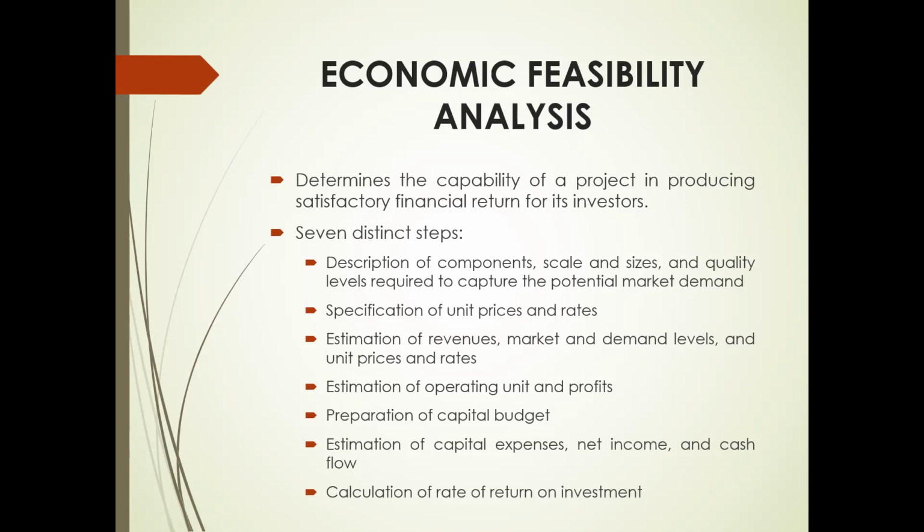The most realistic capital budgets are usually produced by a multidisciplined team consisting of tourism consultants, civil engineers, architects, and landscape architects. The capital budget is first prepared by identifying all the capital costs to be encountered, then pricing out each item.